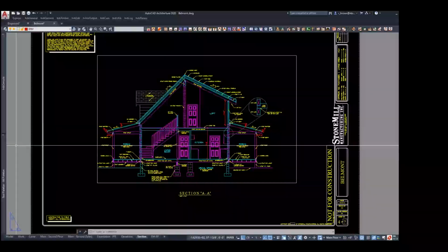And if you tell us, hey, my living room is going to be looking at a lake, I want a lot of windows, we'll use our best judgment, and then we'll have a little bit of back and forth. But the short answer is, once you've had enough back and forth with the plans, and you've looked over the window sizes and everything, when you're dialed in, you're going to get to a point where I'll tell you, hey, it's do or die time, no more changes after this.